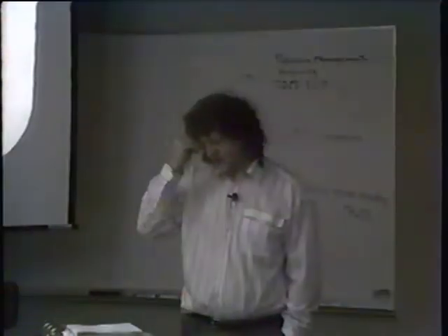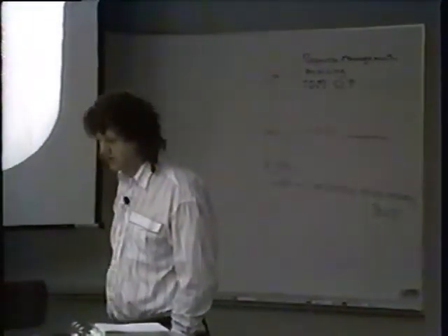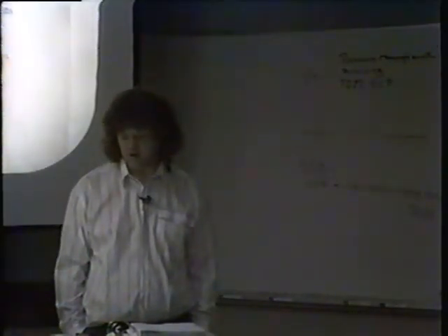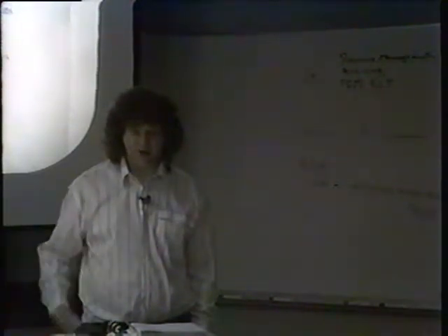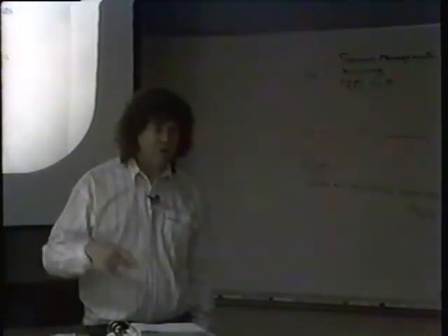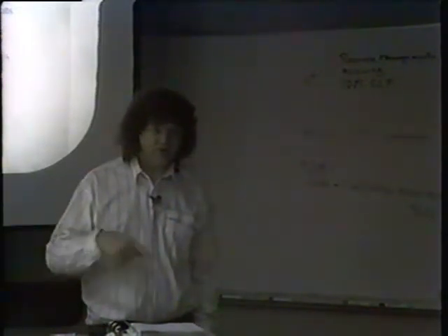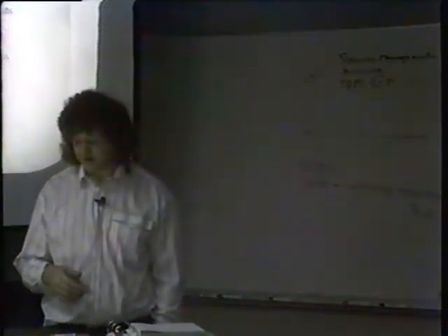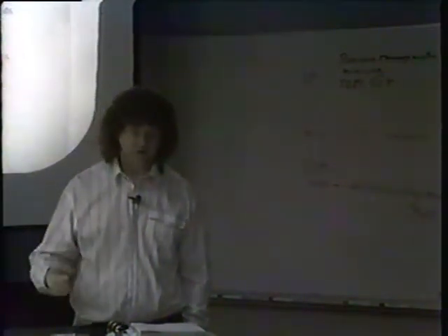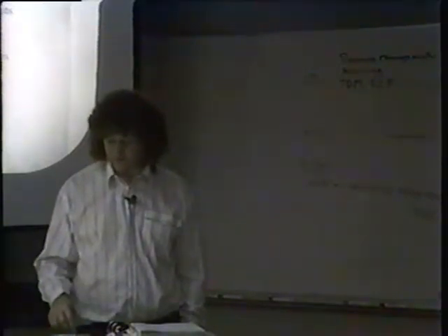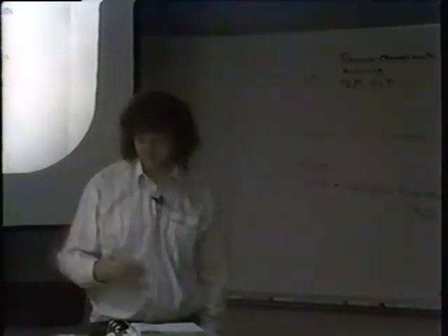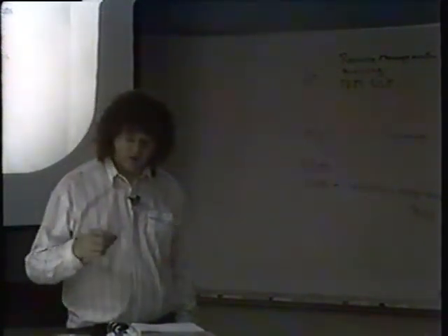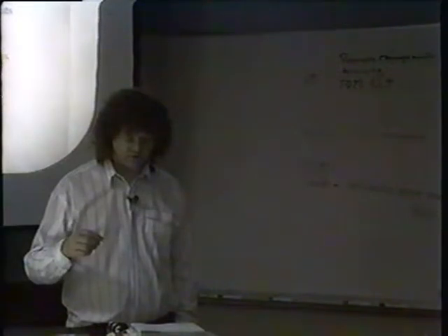At some early point in this migration process, contractual and non-contractual situations occur. Licensing is very important. You want to get your UNICOS licensing started as soon as possible, 6 months ahead of time at least. You don't necessarily have to sign on the dotted line and pay for the license until about 2 months before the installation. At that point, you get presented all the paperwork, and you could stall at that point or delay your installation. But if you're going to do it, you may as well get it done with and get the procurement done on a previous year budget, something like that.